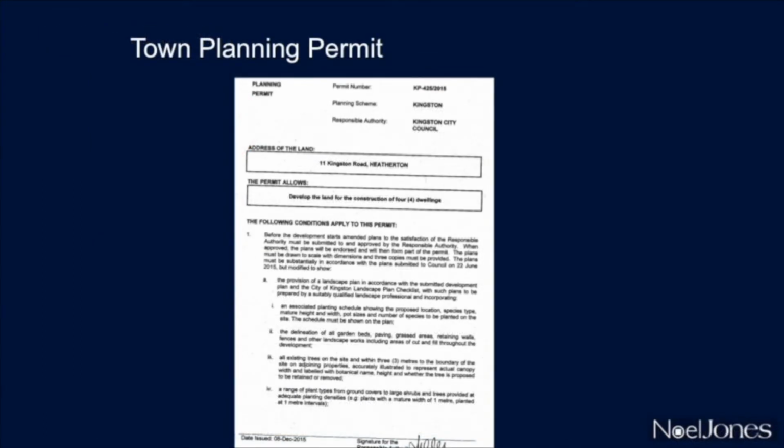One of the most satisfying steps in the town planning process is when you receive your permit. But before celebrating, ensure you read every condition on the document. Conditions may require that substantial changes are made to the design, or that your development requires additional infrastructure to be incorporated into the construction phase, adding thousands to future costs.